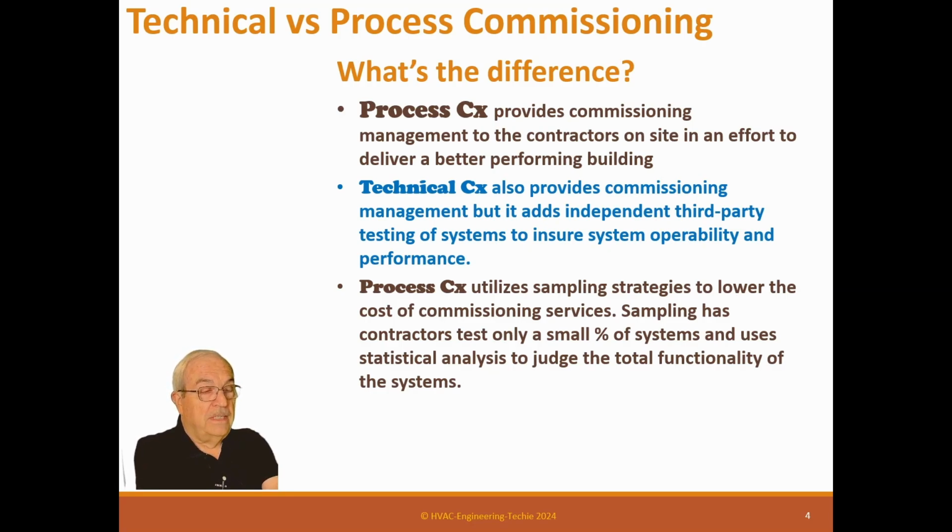Theoretically, sure. But I ask every one of those guys, would you ride in an elevator that's been sampled? You know, maybe you're on the one that it's not actually been tested, but statistically it should be the same as the others. No, and the state won't let you because they mandate they all be tested. Well, it's the same thing. You know, if life is in danger, you will certainly never sample.